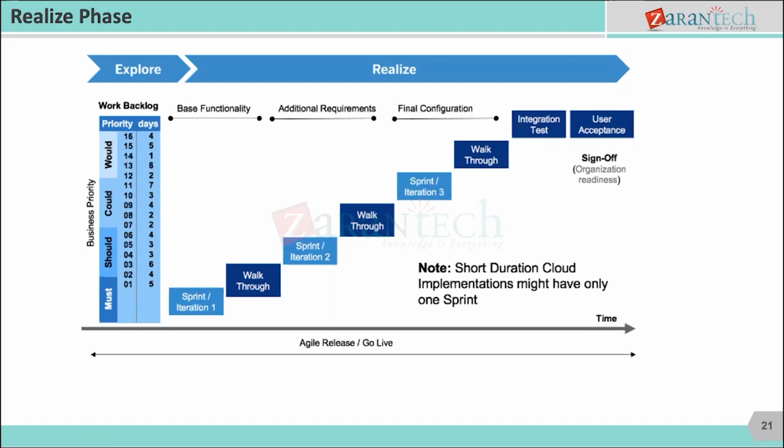They are present in more than 30 countries across the globe. So if it's a huge project with a huge employee workforce, multiple scenarios, localizations and all, the project might even run for 1.5 years. Then you can increase these 3 rounds to 6 rounds or 8 rounds also, not a problem. It all depends upon the IT company and the client, how they agreed. So how frequently they want the teams to meet each other. So based on that, they can design the plan every 45 days or every 30 days, whichever way.